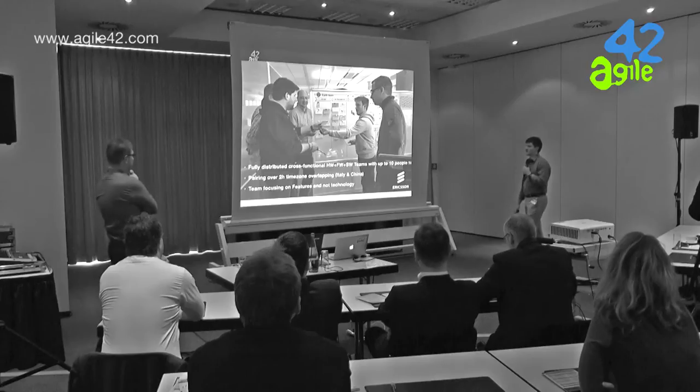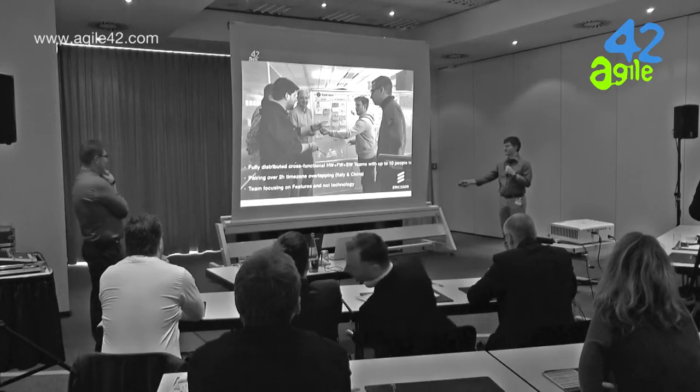Meaning we had 2 people in Sweden, 2 people in Germany, 2 people in Italy, and 3 or 4 people in China working in the same team and doing stand-up meetings over these 2 hours of overlap, and doing pairing on the headphone, looking at the same screen for those 2 hours every day. And then they developed firmware and software in parallel to the hardware development. We'll see later how they did it.